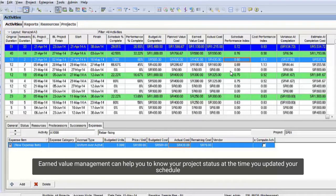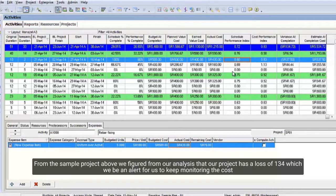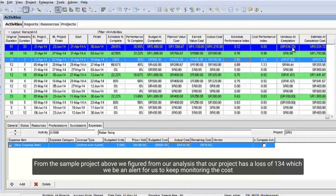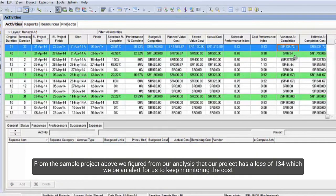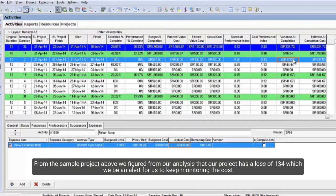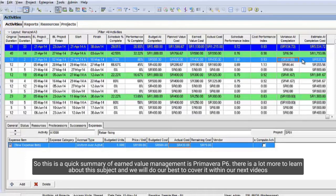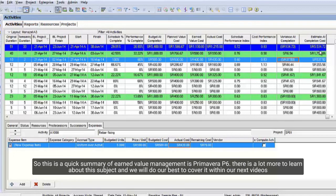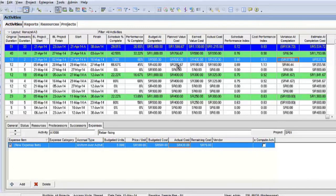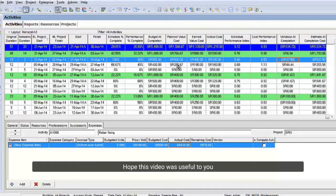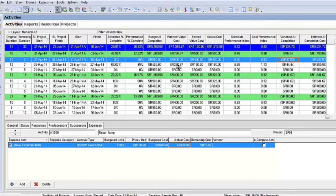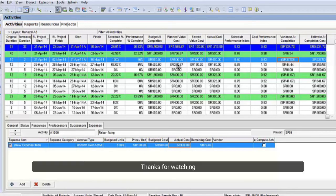Earned value management can help you to know your project status at the time you updated your schedule. From the sample project above, we figured from our analysis that our project has a loss of $134 which would be an alert for us to keep monitoring the cost. So, this is a quick summary of earned value management in Primavera P6. There is a lot more to learn about this subject, and we will do our best to cover it within our next videos. Hope this video was useful to you. Thanks for watching.